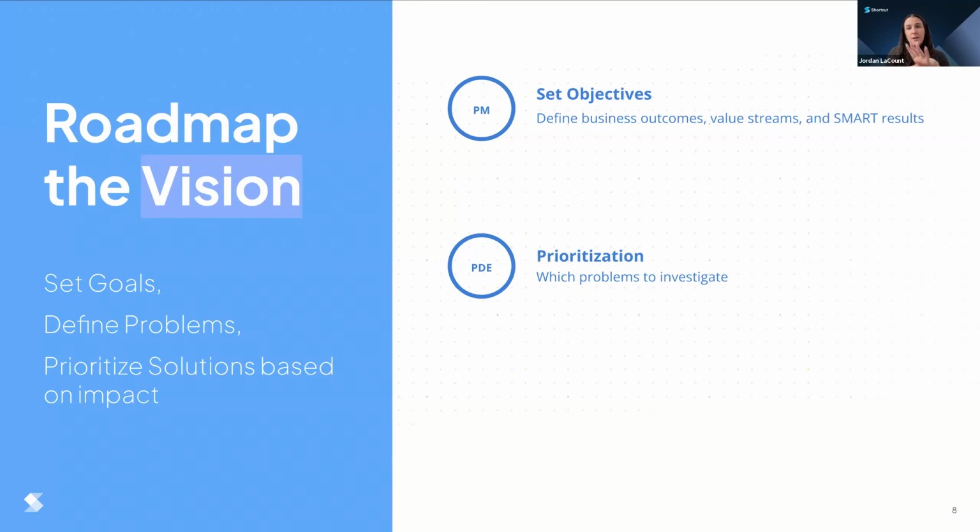To quantify impact and effort, you can use a custom calculation. You can use a simple RICE score, or even just an impact effort comparison if you are at a really small organization and that view isn't too overwhelming. I've tried all of these, honestly. It's really fun to make that custom calculator, but you end up overriding things anyways. Or basic RICE or ICE score tends to be the fastest way to get to this confident prioritization.